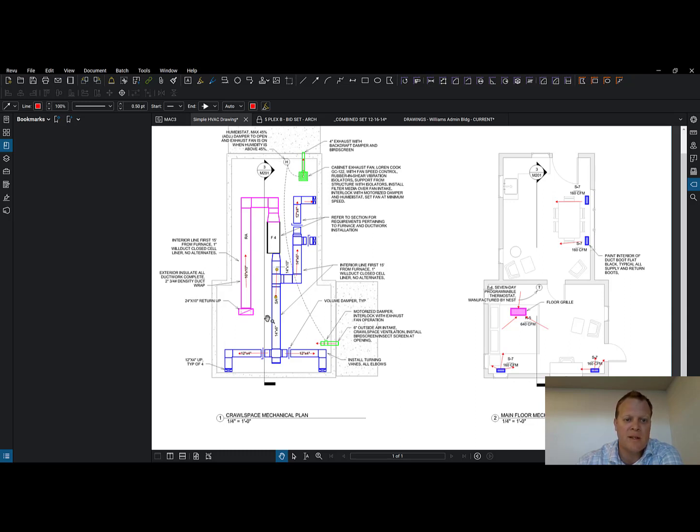Obviously, there's sequence that needs to be done. Could we install this duct? Let's just say we do the foundation, right? Crawl spaces a lot of times are just gravel, so that's something we need to get in there first. We need to get the gravel into this space.